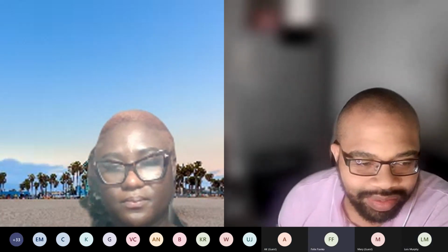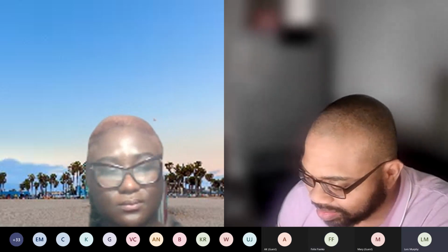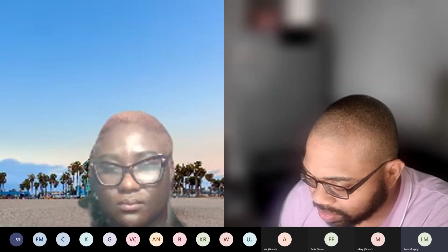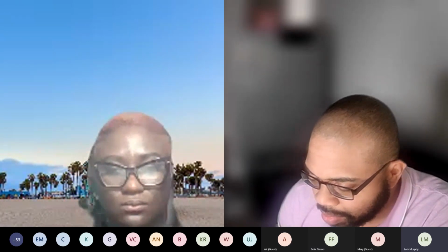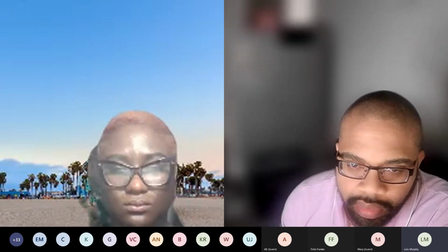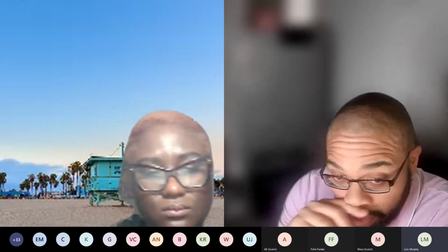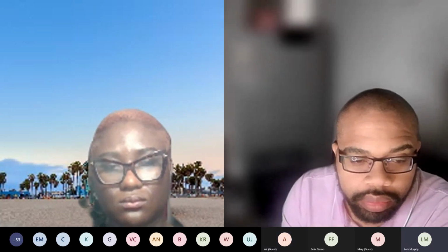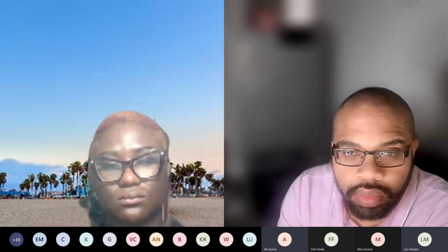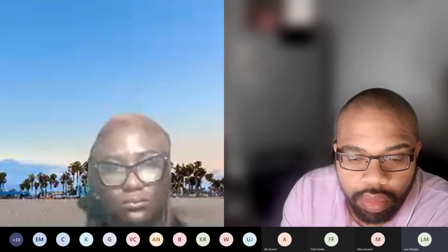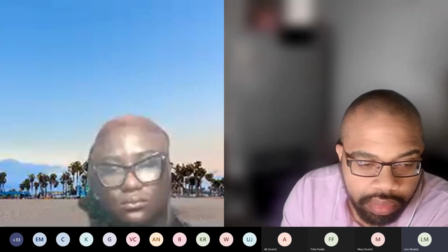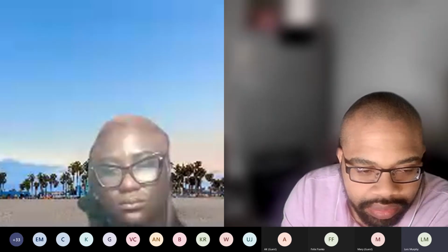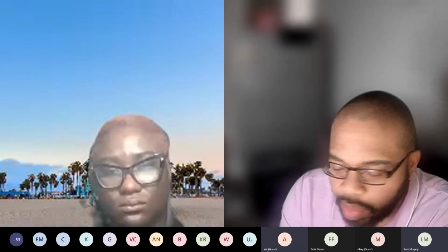Okay. Lois, go ahead. I was just trying to say that you try to reach out to whoever is relevant. In my case, who do I need to see? Who do I need to contact? Who do I need to email to get this blocker or impediment out of the way, or go through the team leader? It would depend on the impediment or blocker. It has to be something the team has to escalate to the engineer level, or is it something at the team level that the team can resolve by themselves?